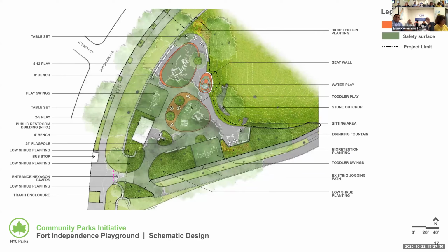And then I think the other big concern of the community was the closing of the walkway during construction. Do you want to address the compromise there? So we're not definite yet, but we're going to try to, at least during the building construction, because that doesn't have as big of a footprint that will be under construction, we could put the gate inside so that the main entrance can remain open. And then they would just use flagmen whenever trucks are going in and out.